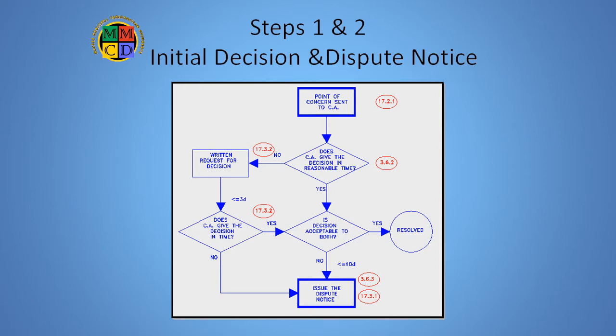Let's look at the steps in detail. Here's the first step. Naturally enough, before you can get into the dispute process, a dispute must be created and defined. We require any point of contention to be put to the contract administrator for a defined initial decision pursuant to GC 3.6.2.